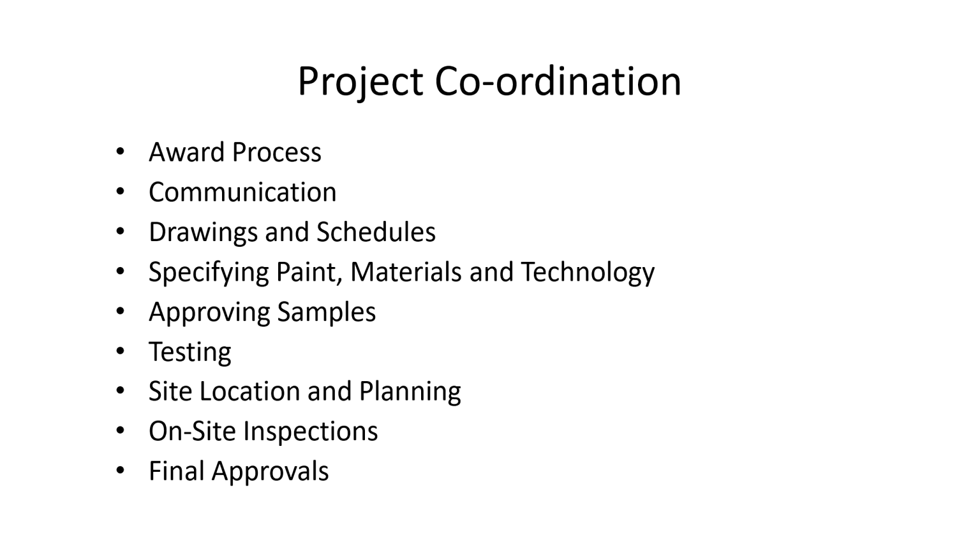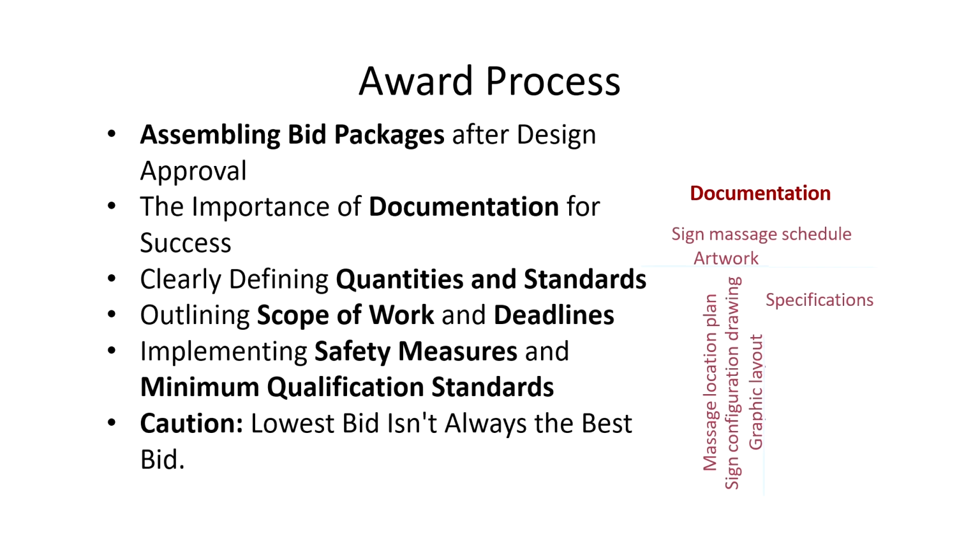So, these are the basic definitions which we have gone through. Now, let us get into the detail of each. Once all designs are approved, it is time to put together a bid package. This involves compiling all the necessary documents and information to send out to potential vendors and contractors for bidding of the project. The documentation plays a critical role in the success of any project.